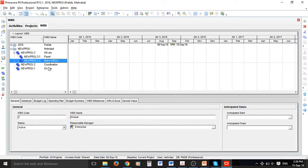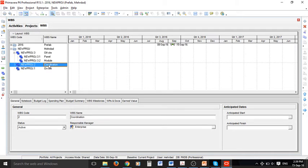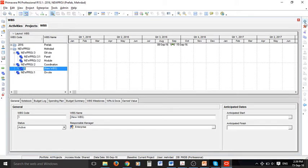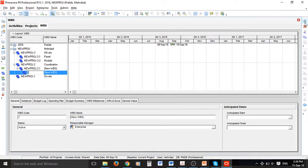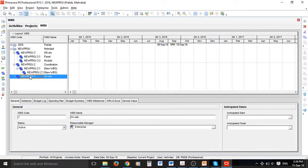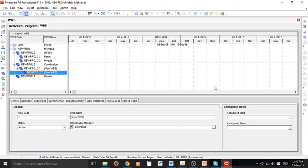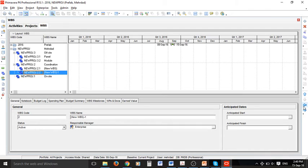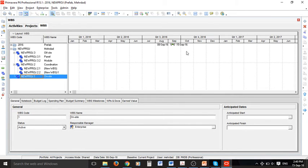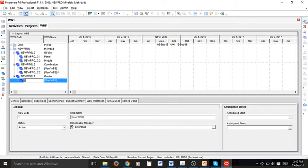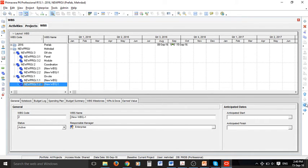I can do the same thing for other levels of WBS. If you press plus sign, different levels are added. It is important to check if the level of work breakdown structure is not appropriate like the one we have in here. You can select that level, and with the arrows we have in the right hand side menu, you can move the level of work breakdown structure. The same thing for onsite, and I can move the last level and push it back.